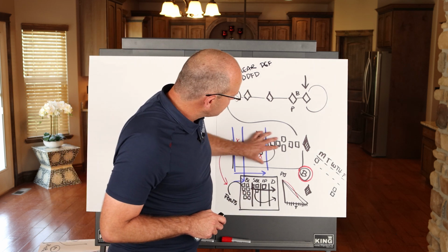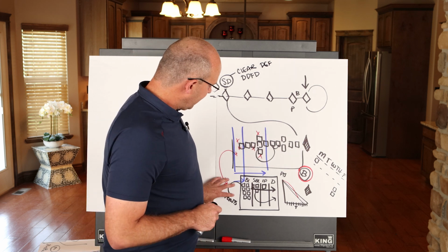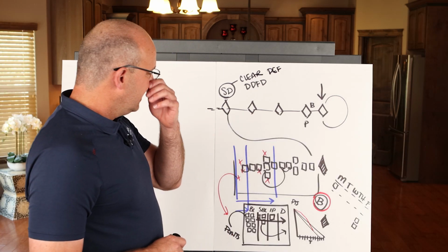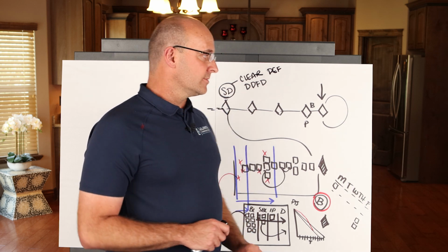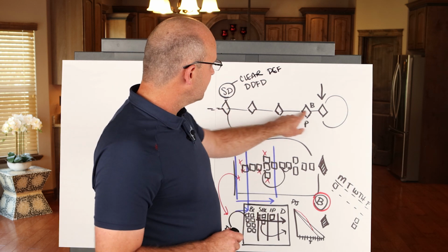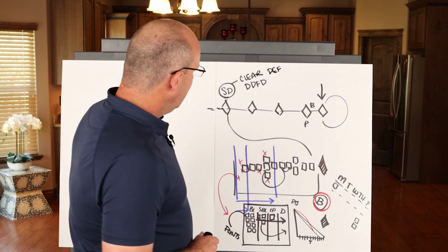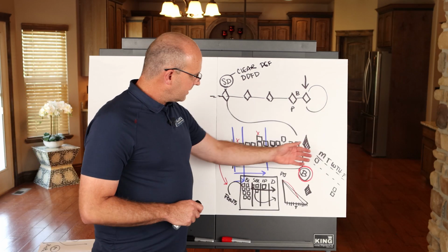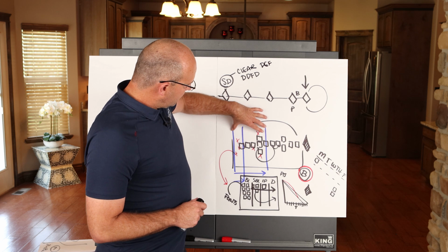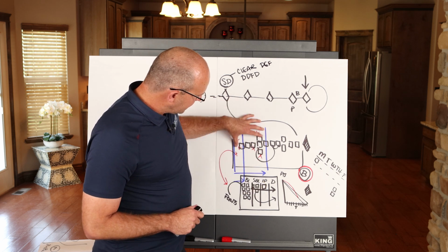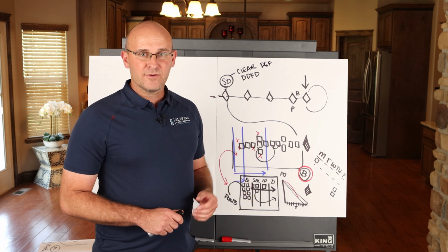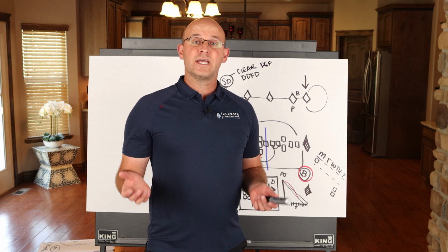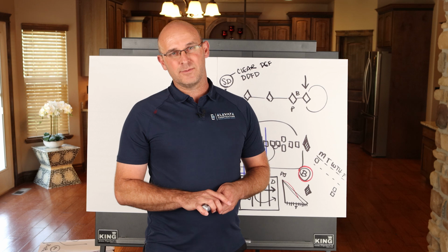If you want more information about the Last Planner system, read the book, The Lean Builder. And if you want more information on Scrum, read Construction Scrum by Felipe Engineer. But the bottom line is, step number 1, know when your design phase milestones are. Step number 2, make sure that you do a milestone or a phase pull throughout with the designers. Step number 3, you will do a pull plan or a brainstorm on your backlog within that milestone. And then step number 4, you will constantly do look ahead planning, whether you're using Last Planner or Scrum, to stay on track. Step number 5, always track your progress and find out the root cause for why you might not be meeting your deliverables. And if you stay flexible and open and really considerate of the design team, you'll have an amazing experience.